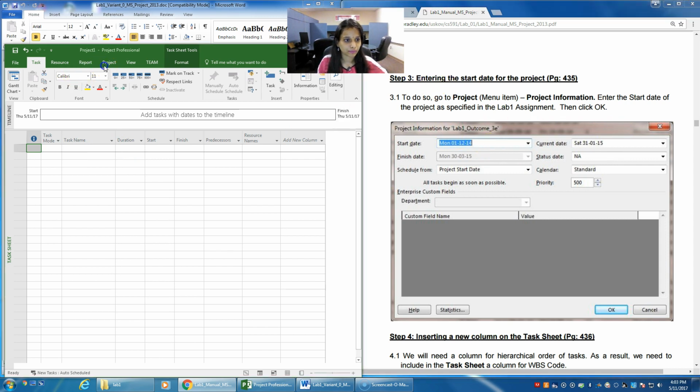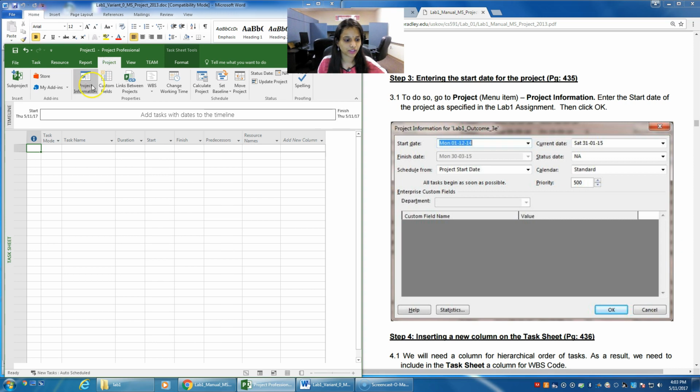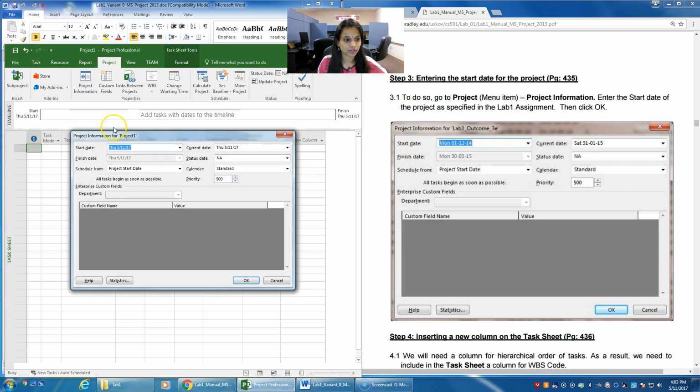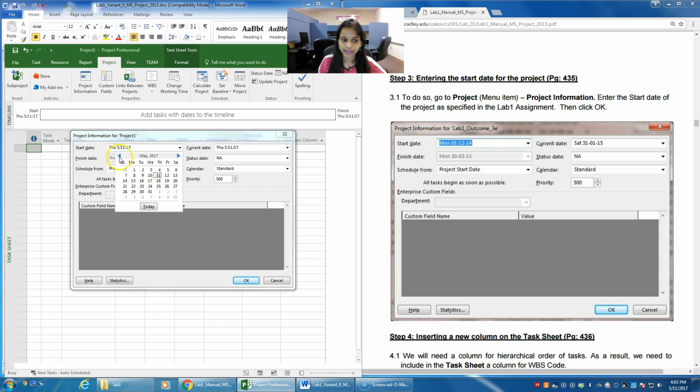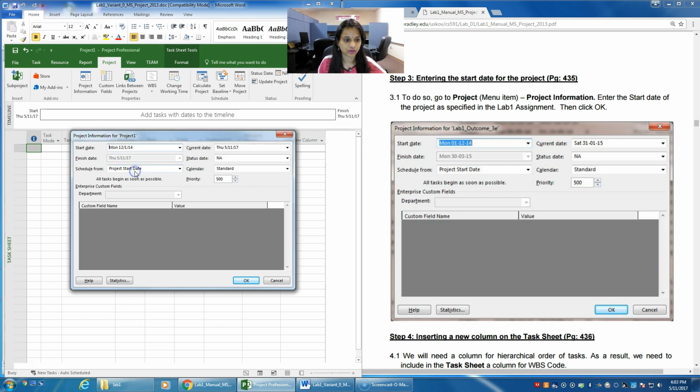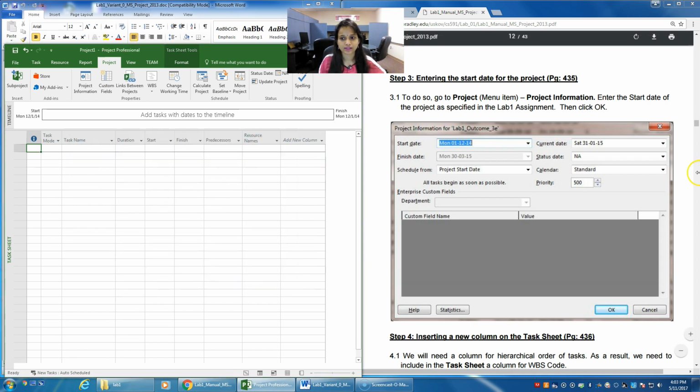So to do that, select the Project menu, click on Project Information, and over here you need to select the start date. You can enter it directly, or you can navigate using the calendar. So I will select December 1st, 2014 as the start date of the project and click on OK. Now your project start date is set to the date that you would like to provide as per your variant.